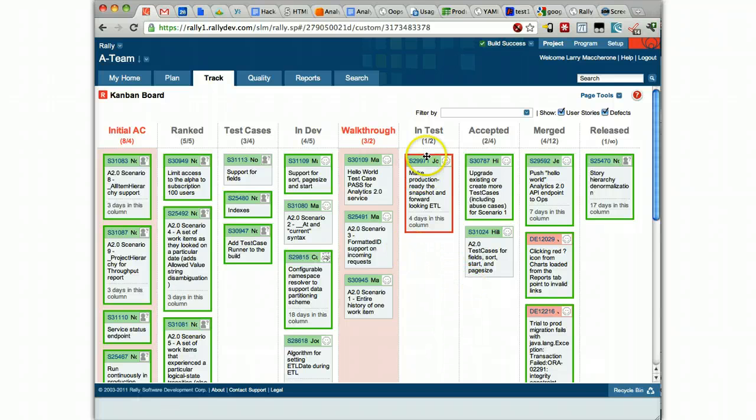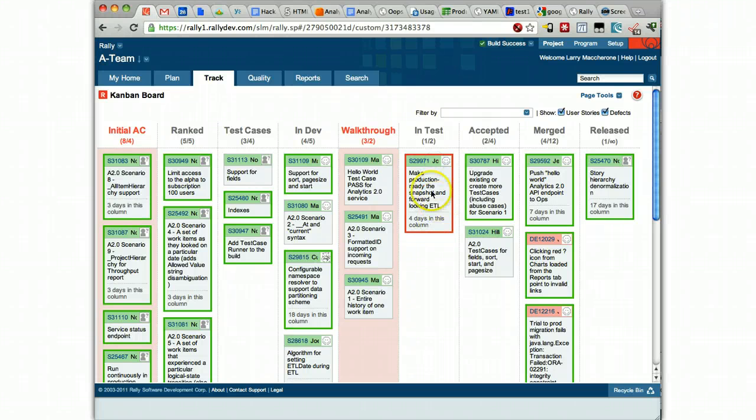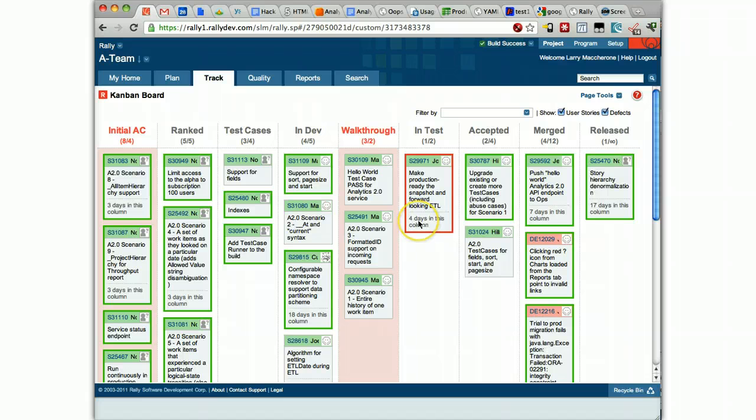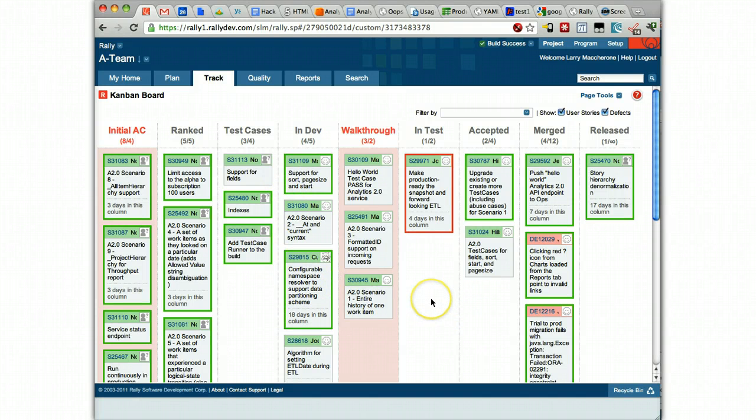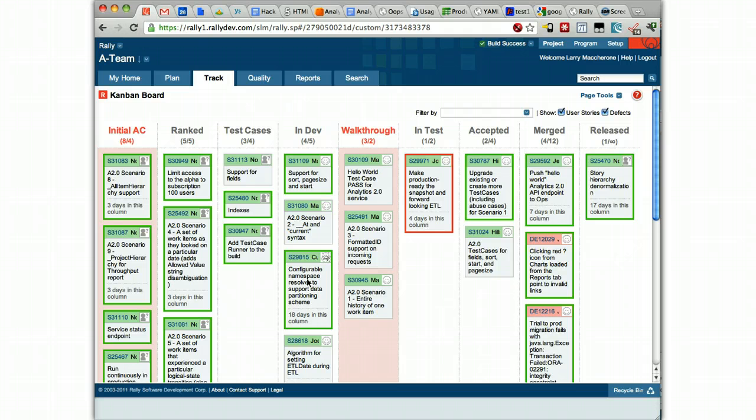We also have the concept of blocked. So this story is blocked. We're waiting on another team, our ops team, to tell us some feedback before we decide that we think this is signed off on. And there's some warnings here. This one has been in this column for four days, and this one's been in this column for 18 days. Typically something is in the dev column for a few days, and that's normal. Anything over that, and we start to try to talk about it. There's some good reasons why this one is here. We probably should have split it out into separate stories, but we didn't, and the team is okay with that decision.